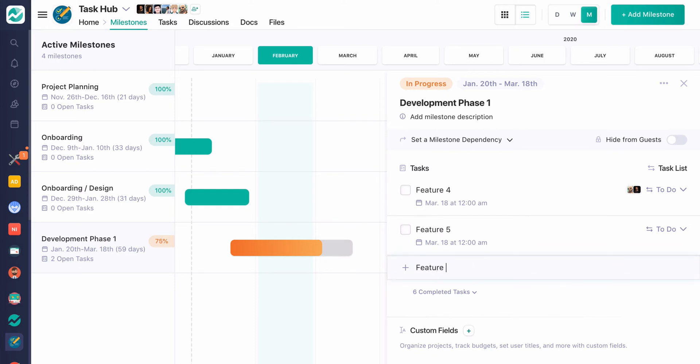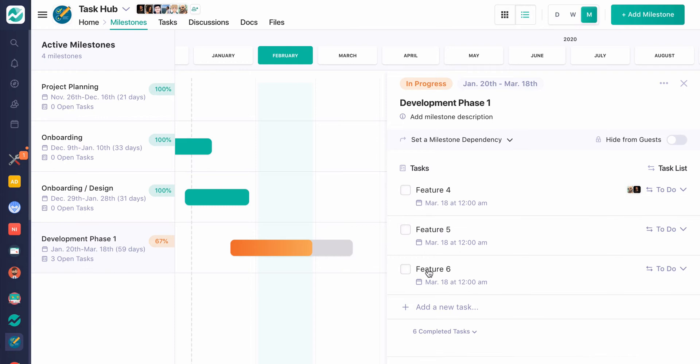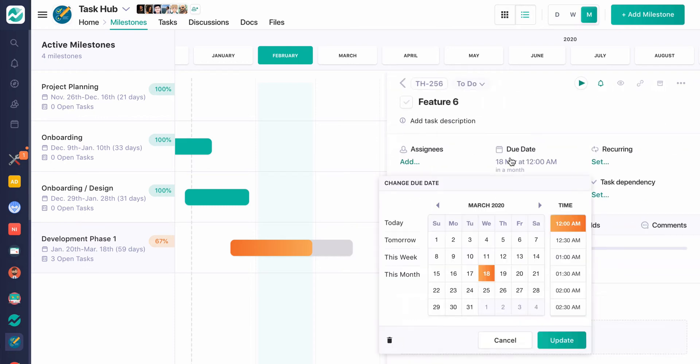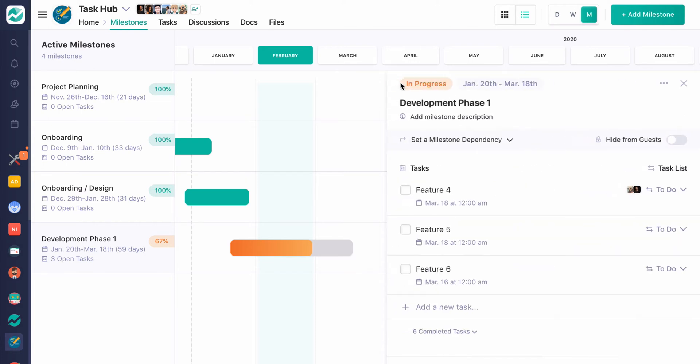So let's say, oh, we got a feature six. Here's a new task. Create it really quickly, like instantly. And it could be as easy as a checklist where you go through and knock these off, and you get that bar moving. You'll see that we automatically give a due date that of the end date of the milestone, and that's to make your life a little easier, so you don't have to go through and give each of these tasks a specific due date. You can, of course, go in and adjust these, and so long as it is inside the parameters of this milestone, you can adjust these due dates. And this gives added value, and we'll see this a little later, on the My Tasks screen.